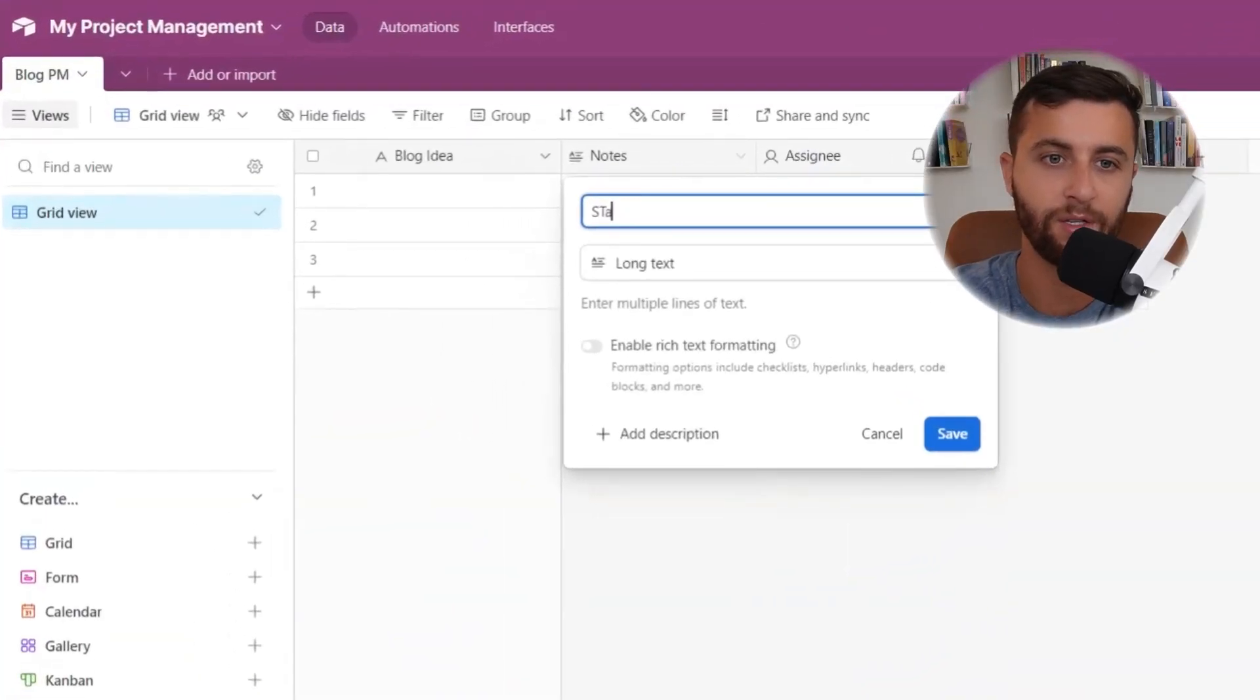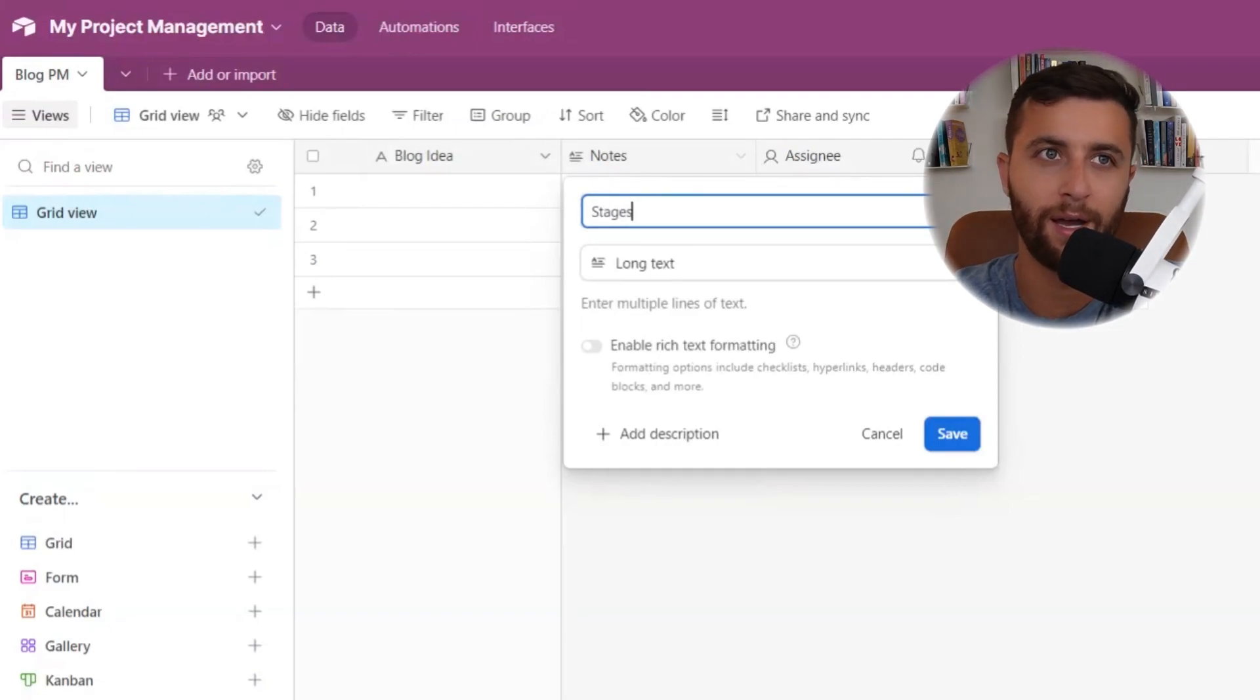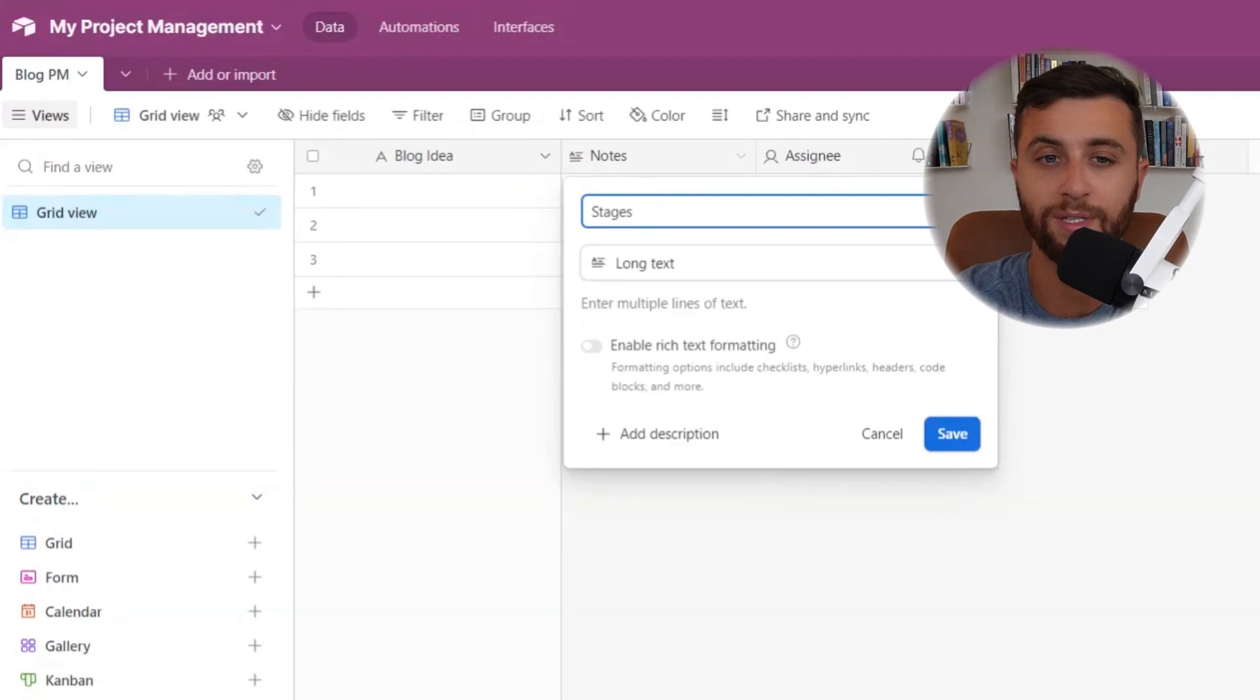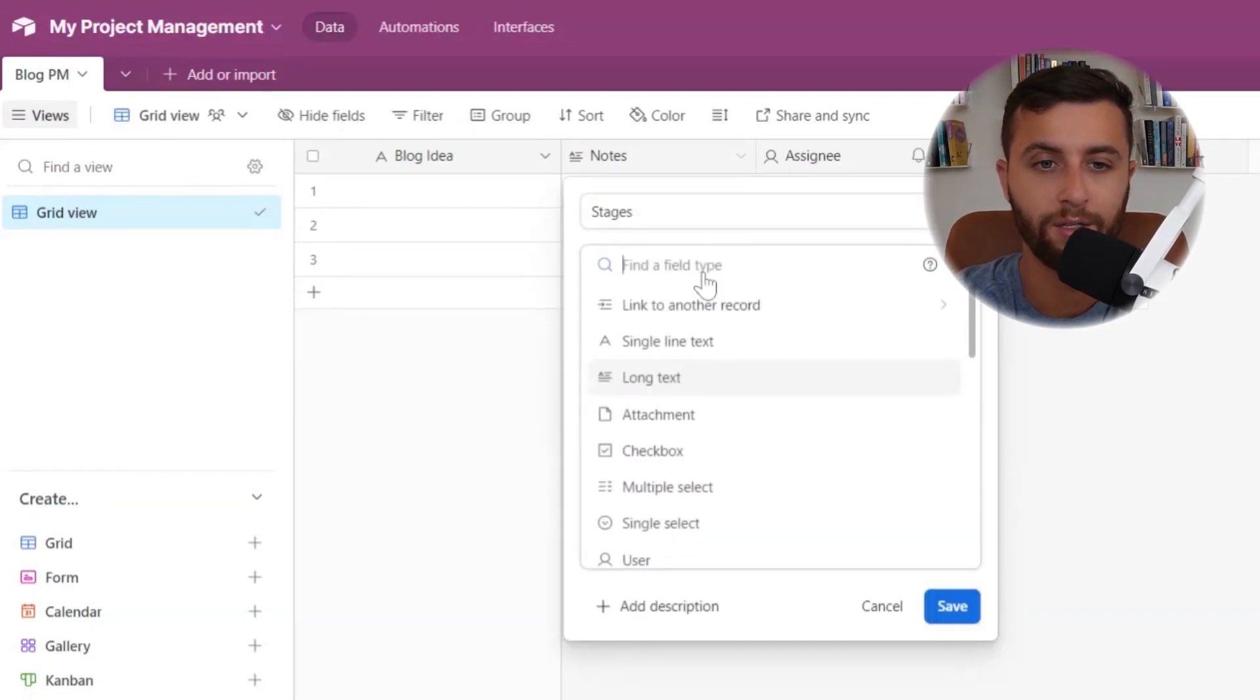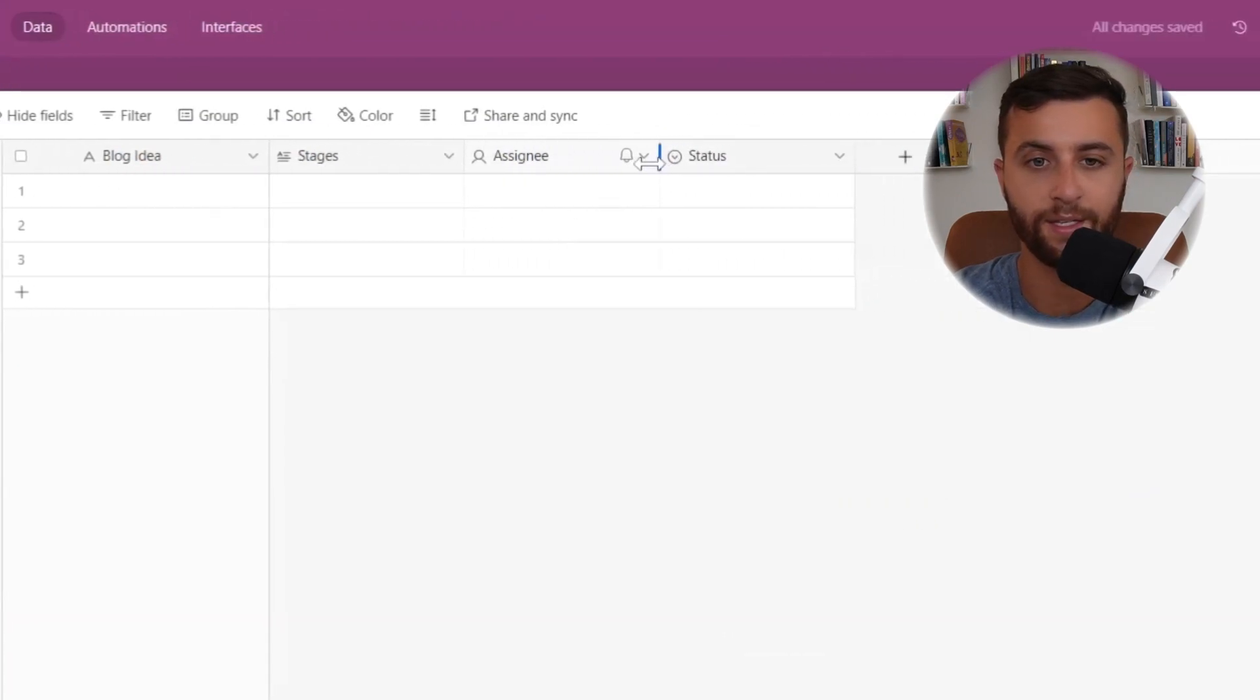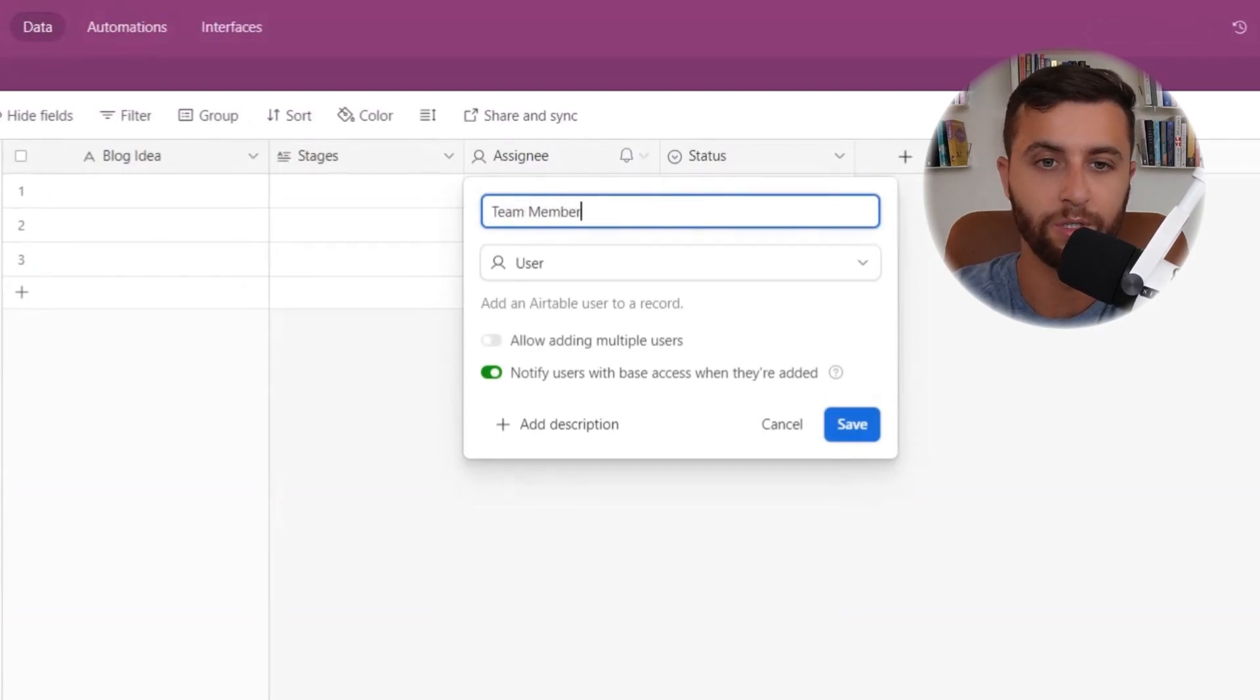One of the things I always like to call is stages in project management. So for writing blogs, as an example, I have the ideation stage, I have the writing stage, I have the scheduling stage, and I have the posted stage. So these are the stages. I'm going to come back to show you how we could pick what type of categorization we want. The assignee is super simple. Which team member is going to be responsible?